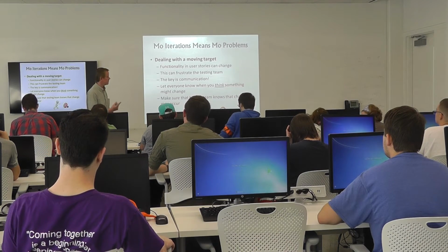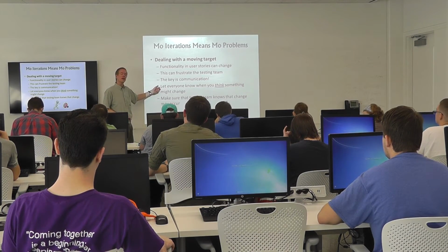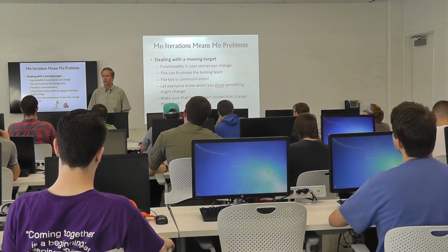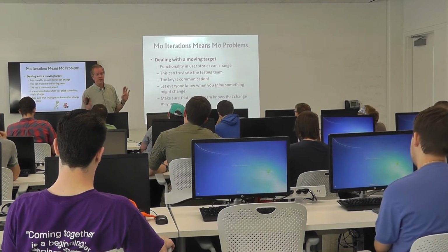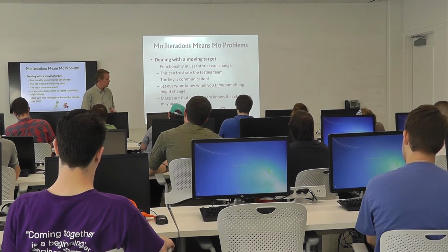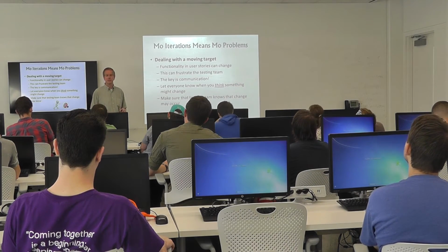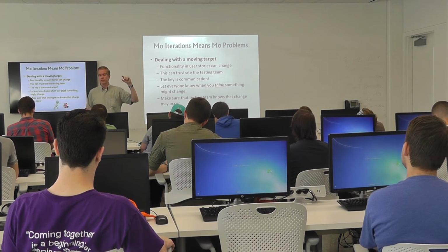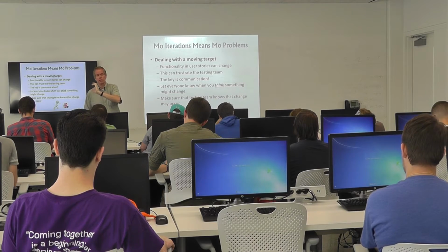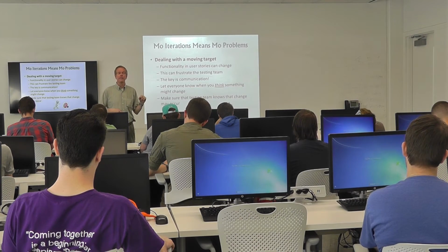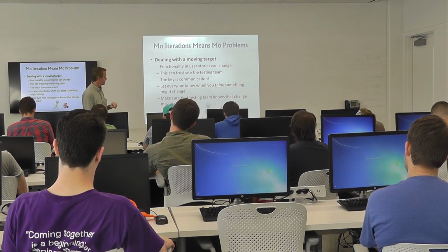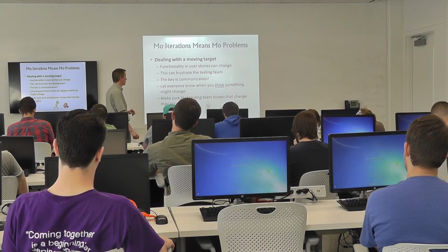But what you can do is, based on your conversations with the customer, when you think there's a possibility the customer might be thinking about changing their mind on something, you need to go back to the team and say, listen, I don't actually know that there's any changes coming, but there's a good possibility the customer might end up changing something here. That allows your team, if they haven't actually implemented that feature or function yet, to push it off for a little bit and do something else. Then if the customer changes their mind, they don't have to go back to the user anymore. So you gave them a little bit of a heads up and it was very useful for them.